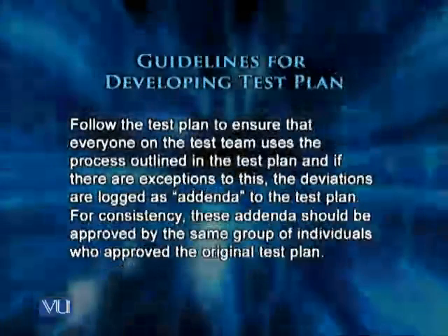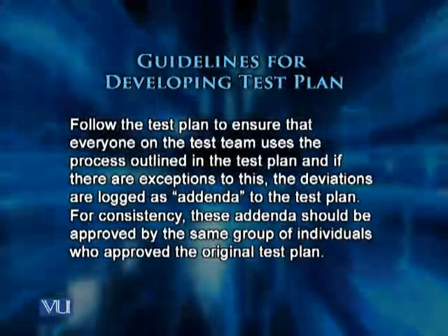But as many departments are affected by the test plan, they should be involved in getting an approval so that they are also committed with the contents of the test plan. Once you have the approvals, you need to follow the test plan to ensure that everyone on the test team uses the process outlined in the test plan. And if there are exceptions to it, they should be documented as addenda to the test plan.